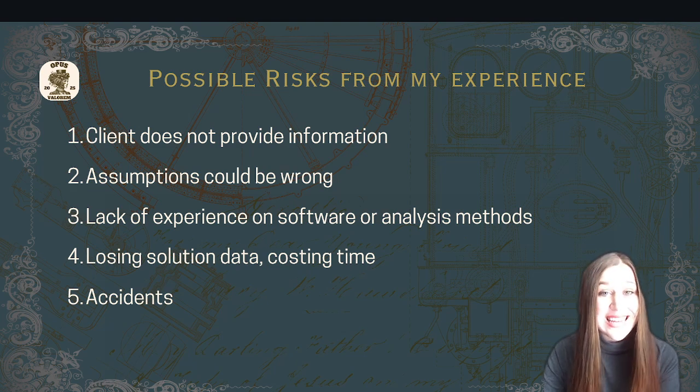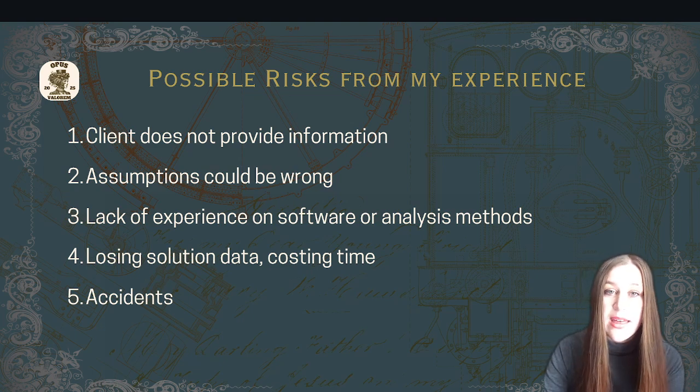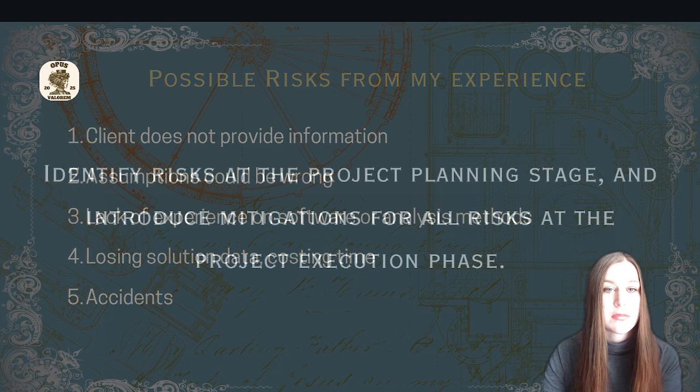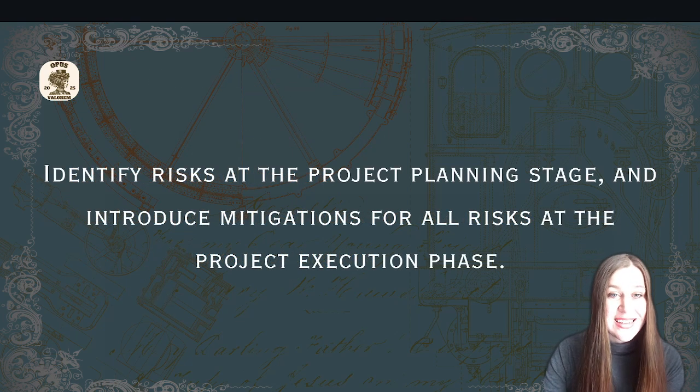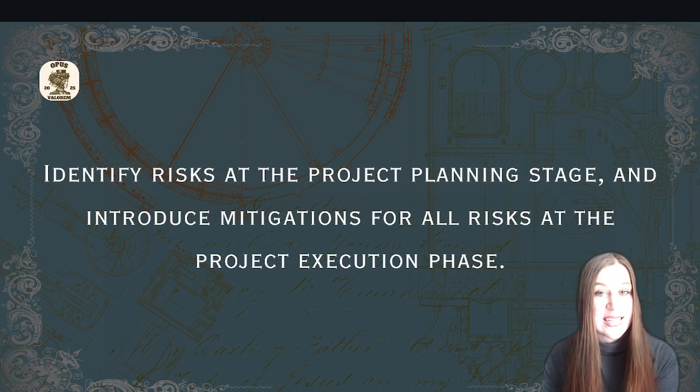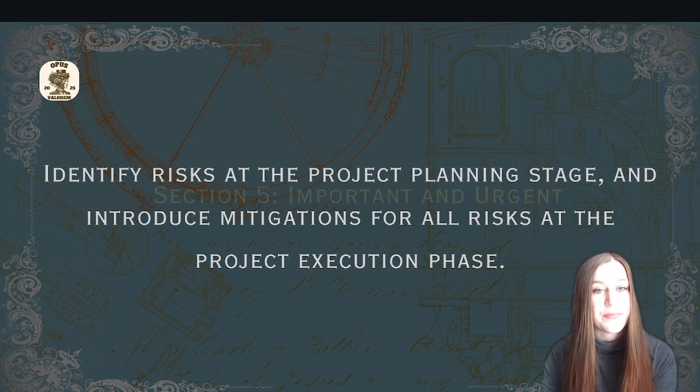But a mitigating action would include something that you've been doing since the first lesson, which is planning ways to improve your standing. The fact that risks are intrinsic in any work that you do is a pain, but clear communication with your project manager and technical lead, and if applicable, the client, about the risks and whether they are mitigated or occurring is vital in project success. A quick actionable tip here is to identify risks at the project planning stage and introduce mitigations for all risks at the project execution stage.